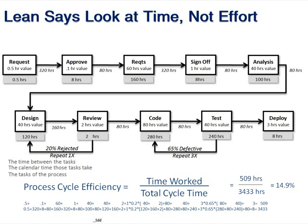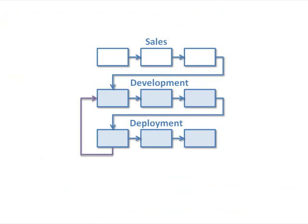People are busy working — maybe you'd have five other projects and overall utilization would be around 90%. People are busy. But the question is: from the time of start to end, it's taking you a year and three quarters, but only about 15% of the time is on this project. So what would happen if we could squeeze this in and shorten the time period?